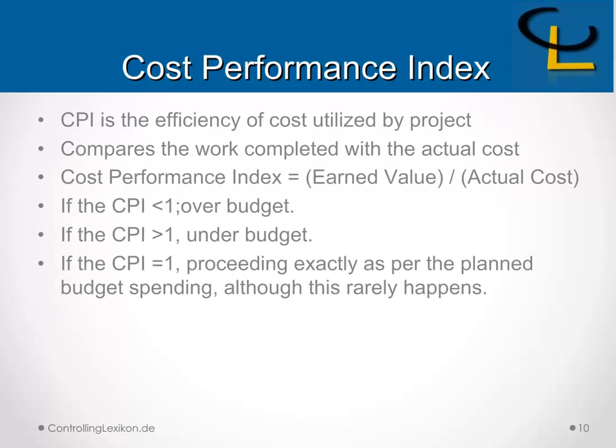Cost Performance Index is the efficiency of cost utilized by a project. It compares the work completed with the actual cost. Cost Performance Index equals to earned value divided by the actual cost.